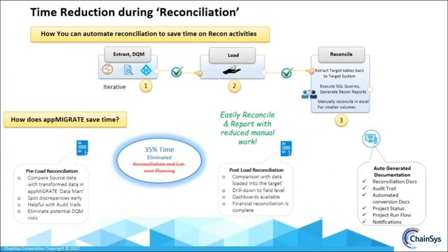And then finally, in the reconciliation phase, there's a preload reconciliation. What that does is it compares the source data to the data that's in your data mart. And that ensures that you've brought everything into that mart that you expected. That allows you to spot discrepancies early on in the process. It's also helpful for audit trails. And it eliminates potential data quality risks.